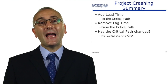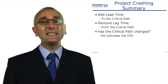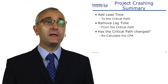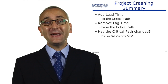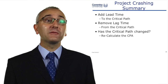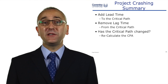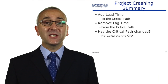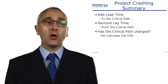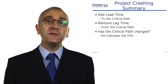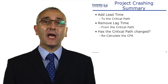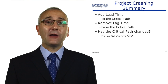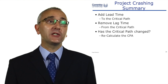Adding lead time onto the critical path should have an immediate benefit. Removing lag time — obviously from the critical path first — but let's optimise the whole plan. And every time we make a change, check: has the critical path changed? Recalculate the critical path.